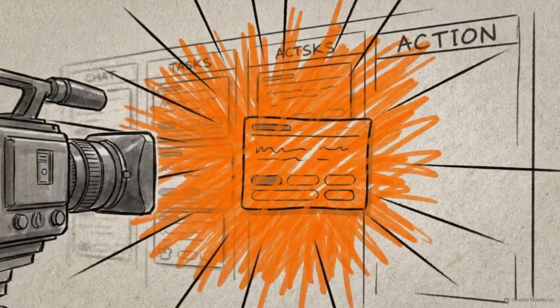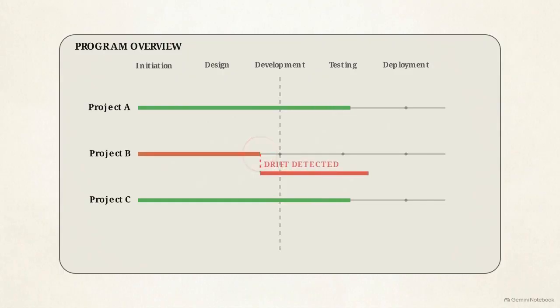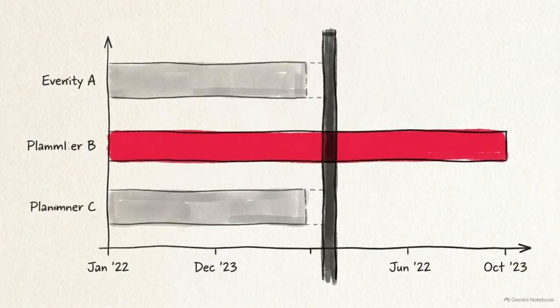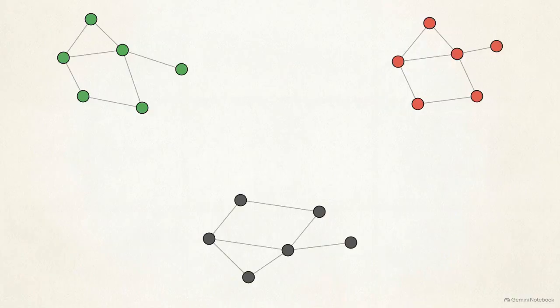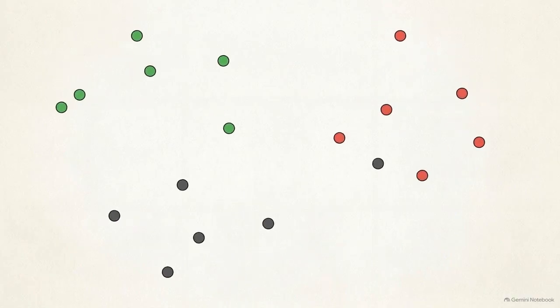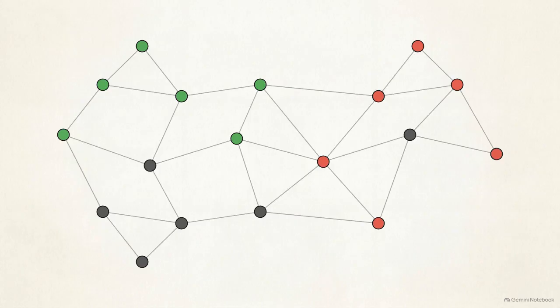Finally, Tempo synchronizes the reporting cycles. Every project reports their status on the exact same day, preventing chronological drift between reports. By enforcing this shared spine, isolated project deviations are exposed early before they can compound into a program-wide failure.